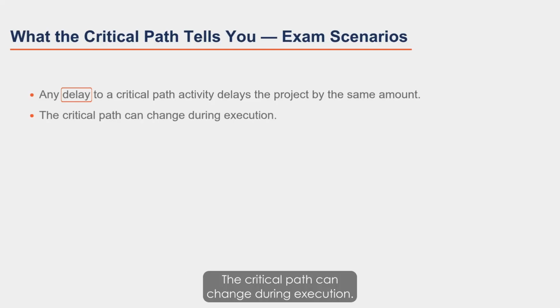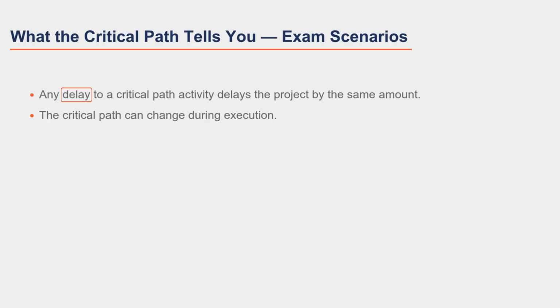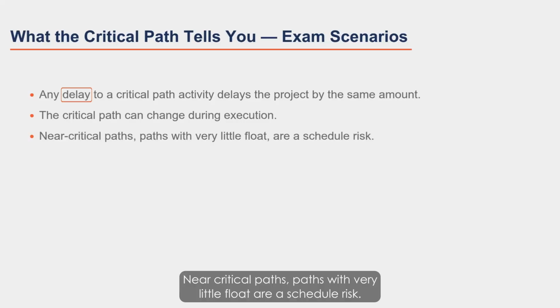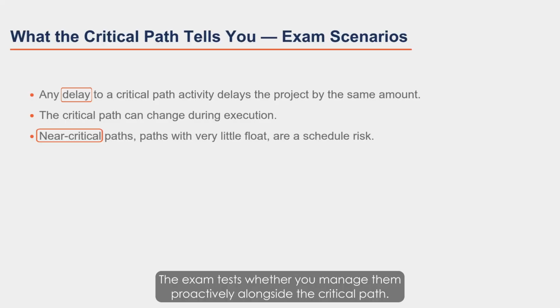The critical path can change during execution. If a non-critical activity uses all its float, it becomes critical. Project managers monitor the critical path continuously. Near critical paths, paths with very little float, are a schedule risk. The exam tests whether you manage them proactively alongside the critical path.